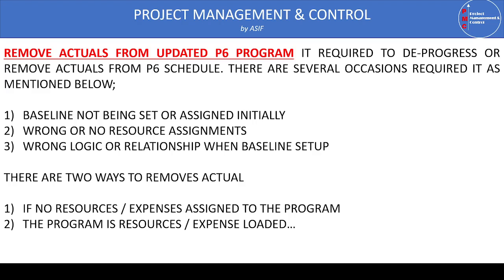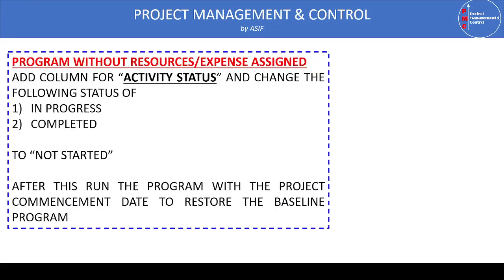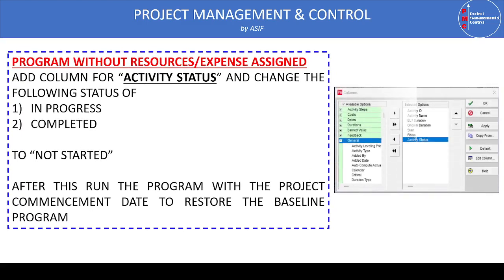This video focuses on programs that are not resource and expense loaded. For programs with no resources or expenses assigned, removing or de-progressing actual dates is very straightforward. We add a column for activity status and then change the status of completed or in-progress activities to 'Not Started', using the fill-down technique to apply this to all activities.